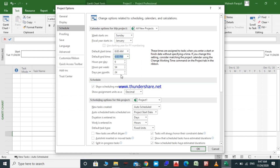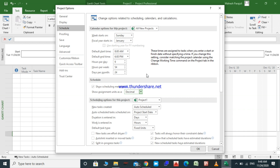Now we are done with the default day and hour settings. For assignment units I prefer using decimal. There are two options: percentage and decimal. For example, if a task requires five workers and the percentage option is selected, we need to assign 500 percent of this resource. If it is set to decimal, we will enter five instead of 500 percent. You'll understand this better when we talk about assigning resources.